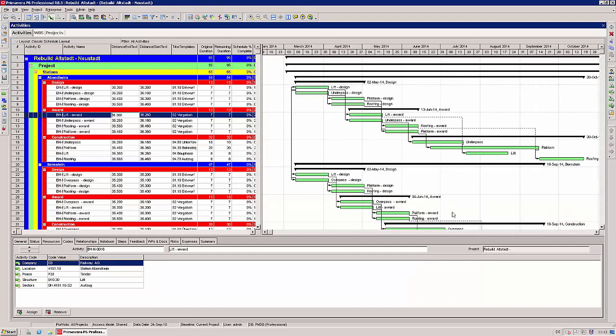For displaying the activities in Tilos time location diagram, the schedule is already prepared as follows. The user-defined fields distance start text and distance end text contain for each activity the coordinate on the distance axis. A user-defined field Tilos template contains the names of the Tilos template for each activity. By this, the presentation of the task in Tilos is controlled.